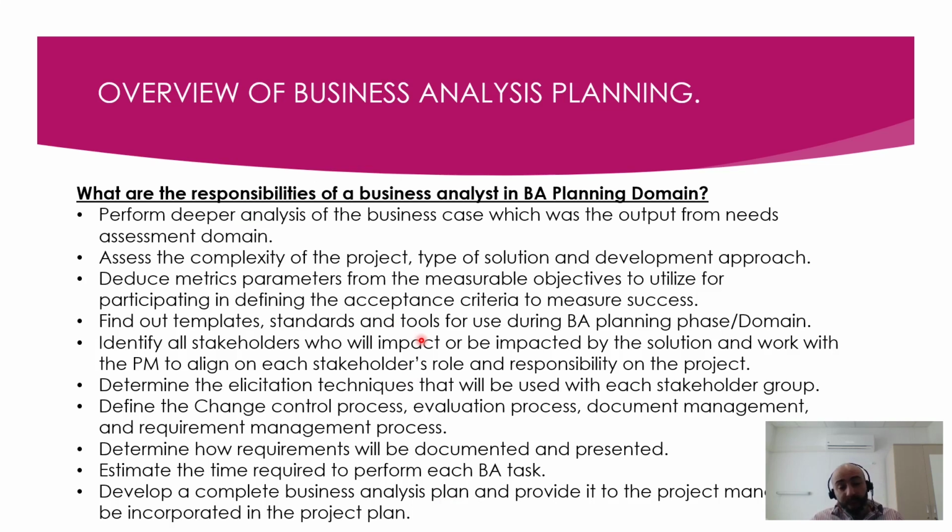Develop a complete business analysis plan and provide it to the project manager to be incorporated in the project plan. So not only the schedule, but a comprehensive business analysis plan which will become a mandatory subset of the entire holistic project management plan.